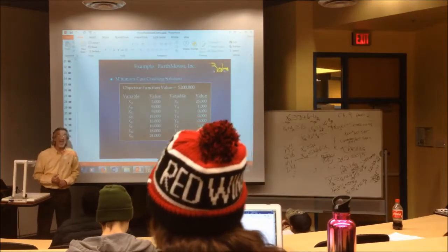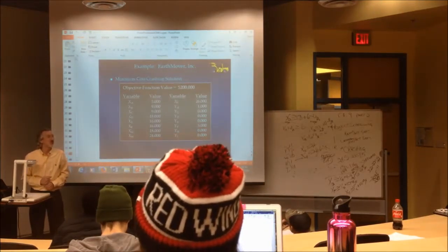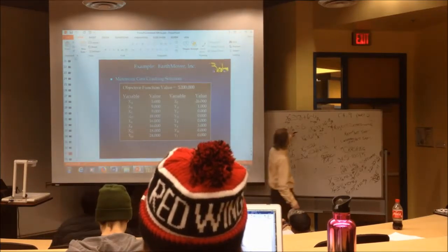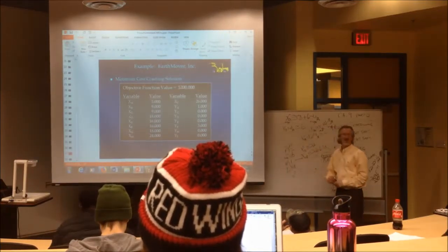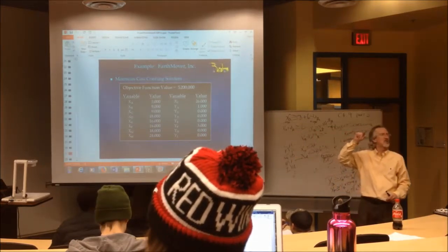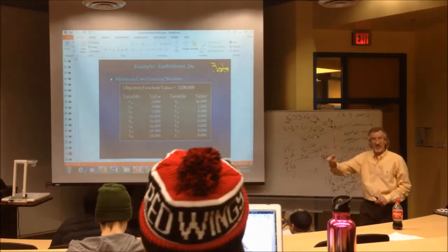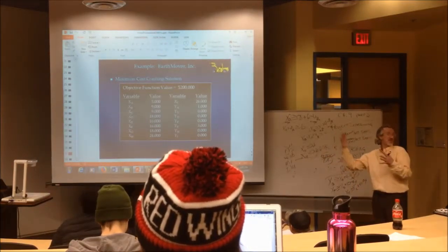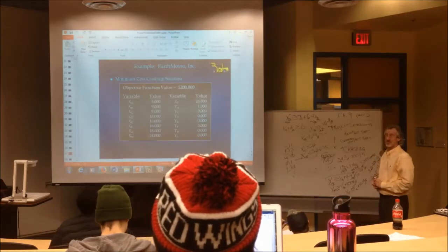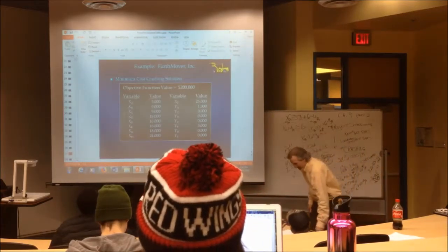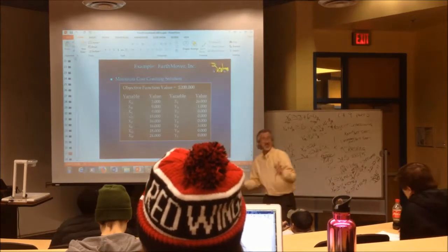A. Activity A is being crashed 1 unit at a time. Let's go to A. What was the cost for A per unit? I erased it. On the objective function, what's with Y sub A? 20 or 50? 20,000 is right there. What else is being crashed? That's 1 week. We're down to 29 weeks. We need 3 more weeks. Y sub F. That is how you figure out which activity is being crashed.